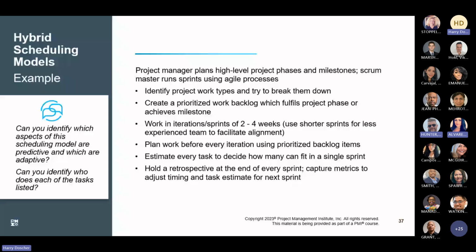And then hold a retrospective at the end of each sprint. Things that can occur there are capturing the metrics to adjust any of the timing and task estimates for the next sprint.